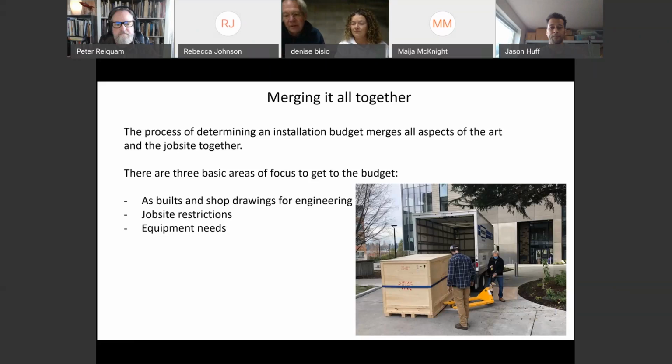We've been doing them on a small scale for quite a few years, and every fabricator seems to expect a little bit different approach to the drawing, what they want to get from the drawing. Long story short, this is another thing that you need to budget into your time, if not your contracts, because they do take a lot of time. It takes a lot of discussion with the installers, the engineer, and the fabricator to produce an effective shop drawing. So that's another mental aspect of your job that you need to think about early on.